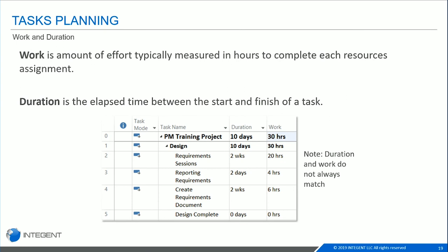Looking from a project scheduling perspective, it defines one day as 8 hours. So if I'm having one day of work, that would be 8 hours, or 8 hours will equal one day, whichever way you'd like to look at it. But in my example of 3 days for 8 hours, it is different, and having all of that knowledge is very important to be able to schedule appropriately.